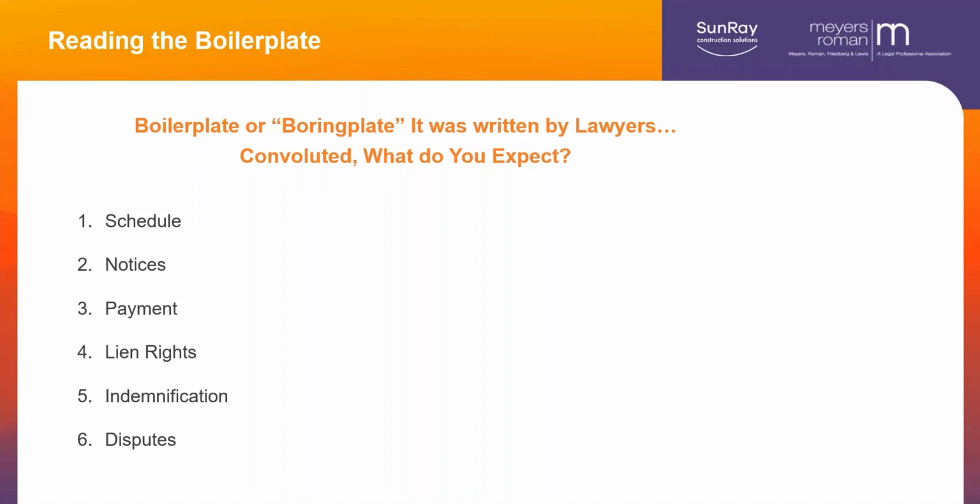What happens if you're stuck with that? You can't get paid unless they're paid. But the language that you now see starts out differently. It starts out in that paragraph and it says, we will pay you within 10 days of the day we are paid. That's a pay when paid clause.